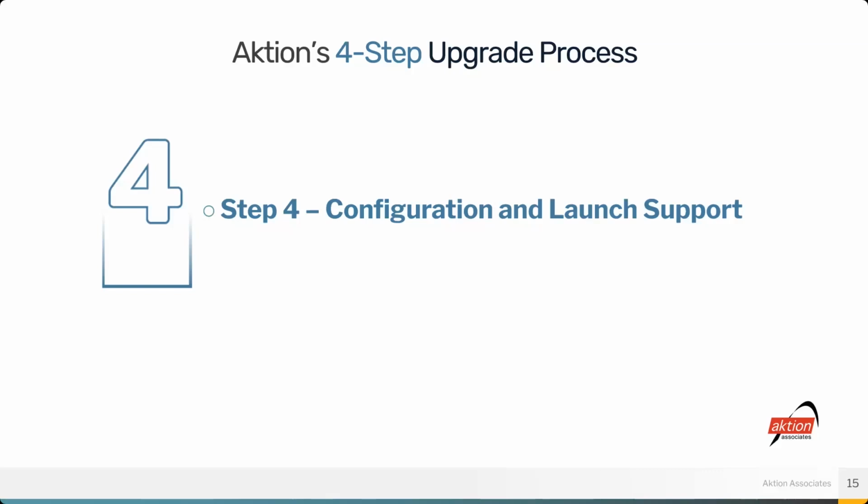So after the configuration, that go live simulation, the user training to your staff to get them up to speed in terms of how to use the system, and then going into that go live timeframe, preparing the system for that final step of going live, and then also providing post go live services for that.